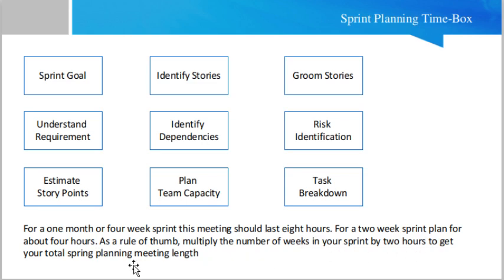A sprint planning meeting consists of: defining the sprint goals, understanding the requirements, estimating story points, identifying the stories, identifying the dependencies, planning the team capacity, grooming stories, risk identification, and task breakdown structure. These are the key things that a sprint planning meeting consists of.